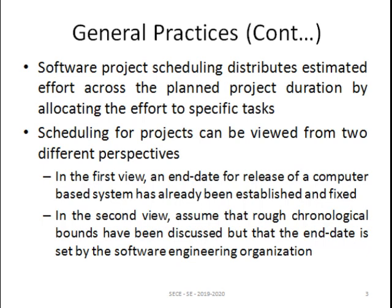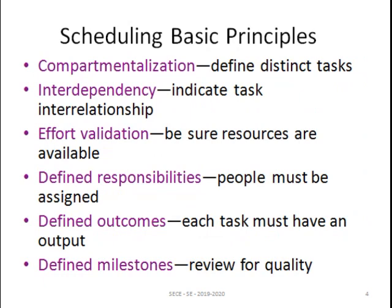The second view assumes that rough chronological bounds have been discussed, but the end date is set by the software engineering organization. For each and every task you will have a date for completion, and also a delivery date for the entire project. The date is fixed by the software engineering organization, not by the customer. Resources have to be allocated for completing each and every defined task — that is what we have to do in project scheduling.